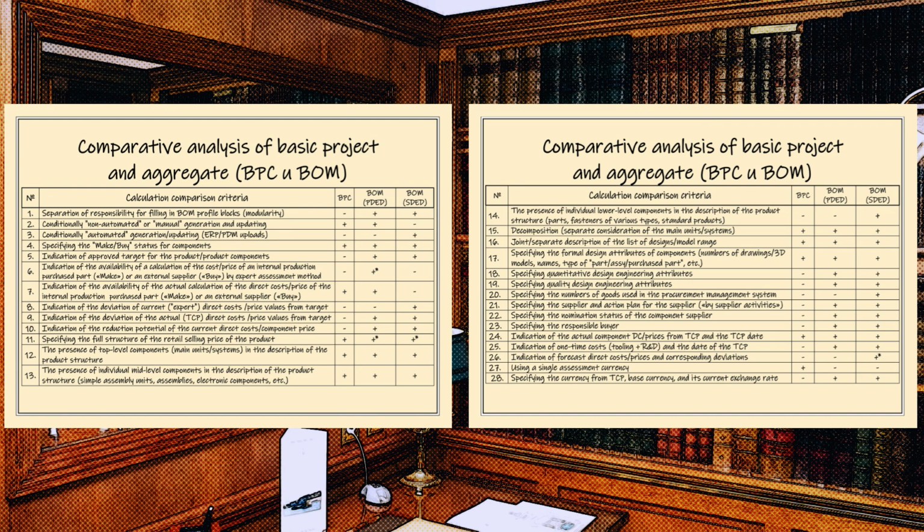Thus, sooner or later, there comes a time when the manual undecomposed BOM, one file tab, increases to such a volume that it first goes to the state of manual decomposed BOM, or several files tabs, and then it must go into the state of automated BOM, decomposed or undecomposed, depending on the degree of complexity of the product. As part of the cost engineering course, we draw the boundary of the second of these crossings at the end of the technical proposal milestone.